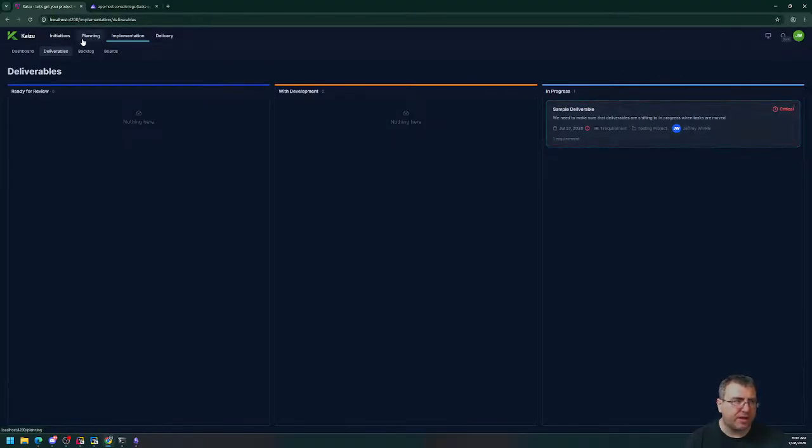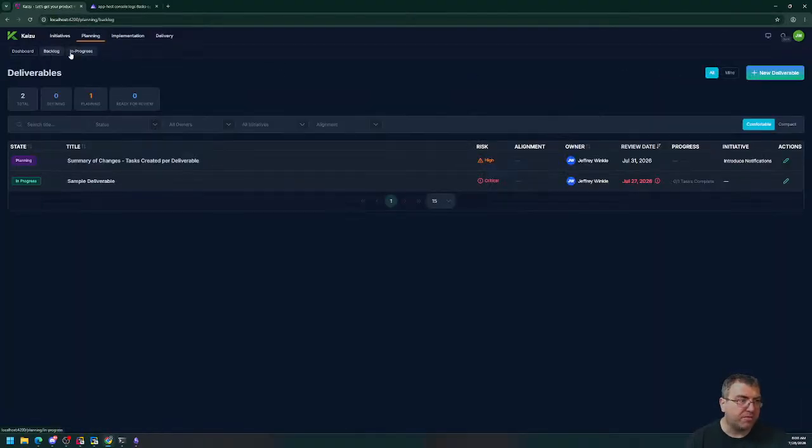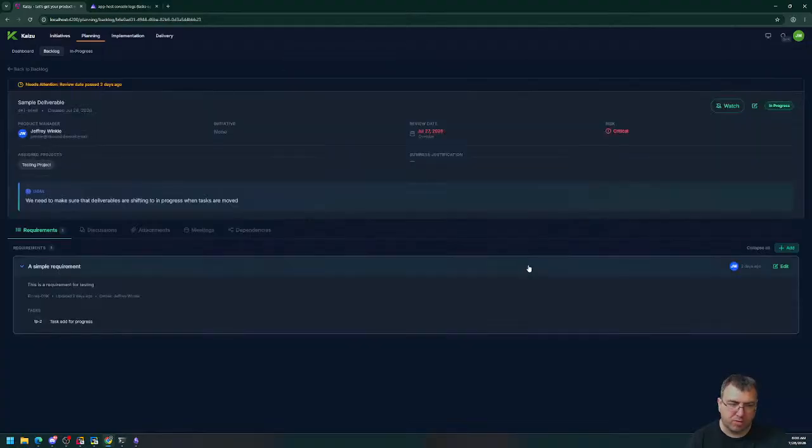And requires that I allow something. Because if you miss a requirement and I say, no, it's in progress, you can't add requirements, then it creates a mess because then new deliverables have to be created that add on the requirements to the others, and then you have to track those. So it creates more process. And that's what people will do. People will create process around that.